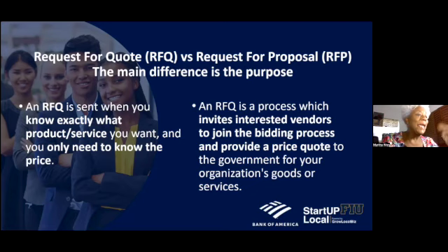As I said, for any contracts that are expiring in 2024, the government is obligated to start the procurement process. When we were putting bids out, we had to go from 12 to 9 months. So let's say I needed to award a contract for that commodity, and this is September 2023.